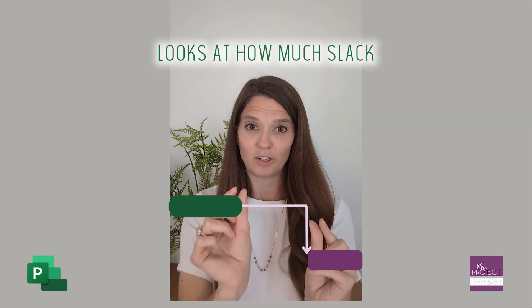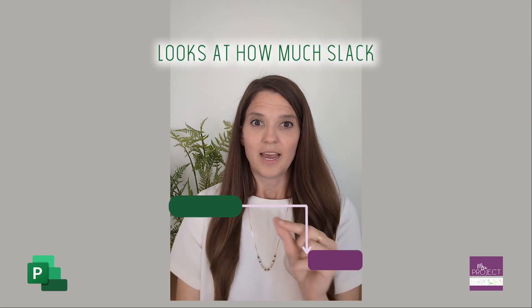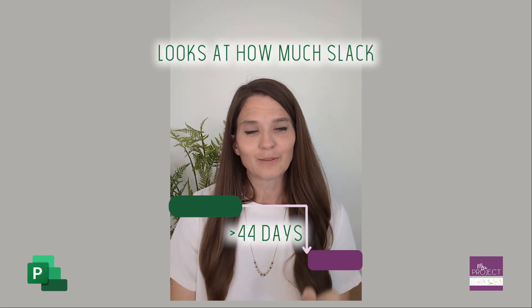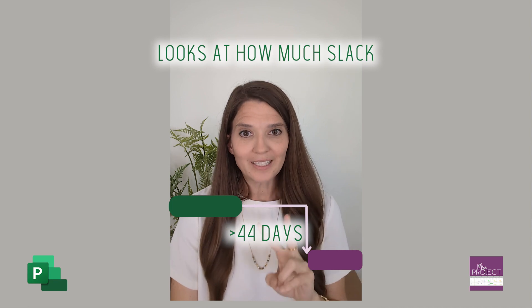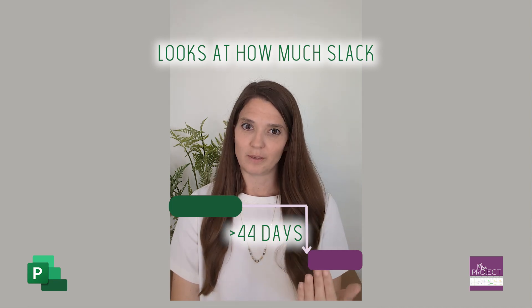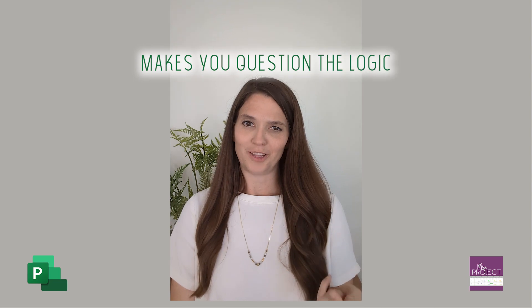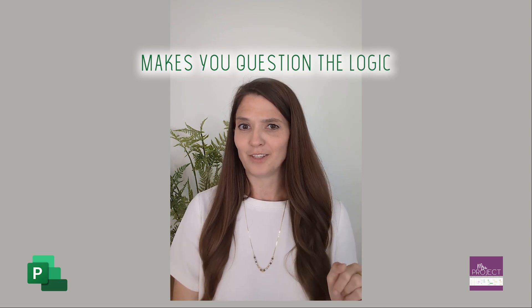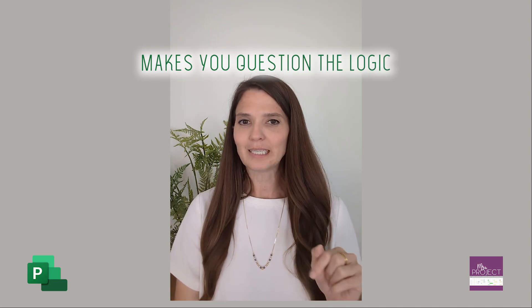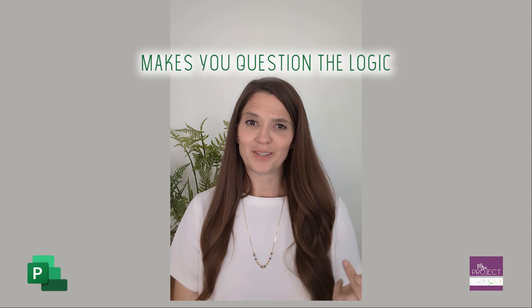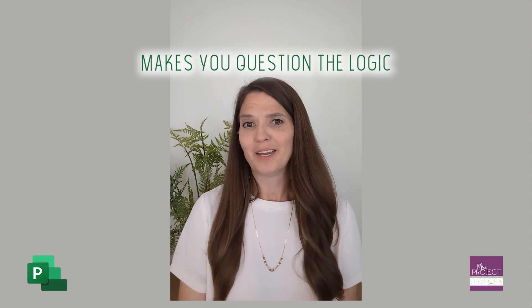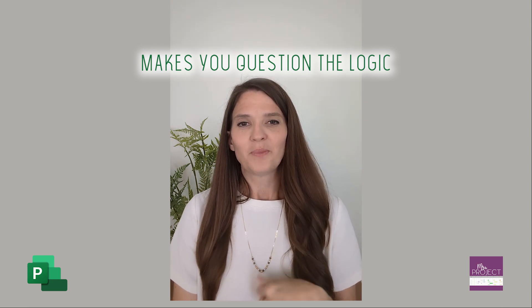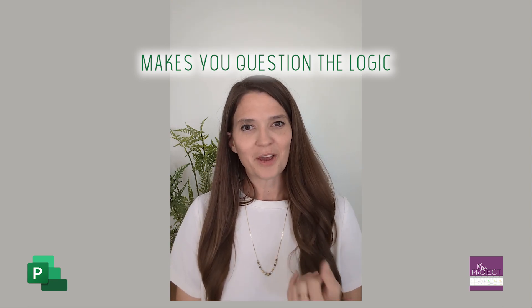So DCMA looks at how much slack there is. If there's more than 44 days, which is two months of slack, it triggers this metric. It makes you go and question the logic of what you really have tied to, because if there is more than 44 days of slack, there's definitely probably another task you can link it to that is dependent on it. So it just makes you think through the logic.